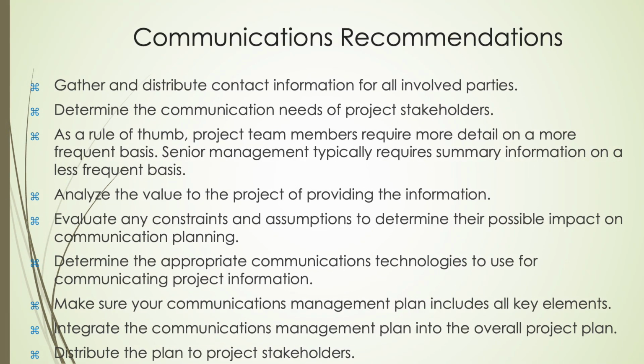Effective communication planning is essential for project success. It begins by gathering and distributing the contact information of all involved parties and identifying the specific communication needs of stakeholders. Project team members typically require detailed updates frequently, while senior management prefers summarized information less often. It's important to analyze the value of each communication to the project's progress.